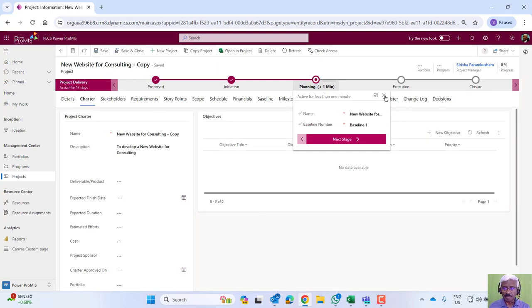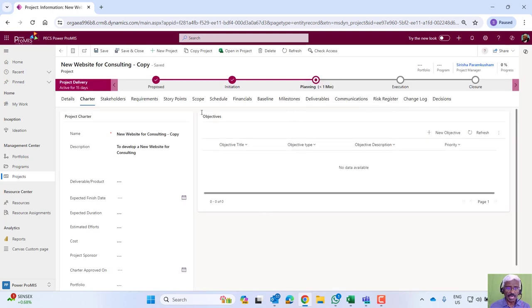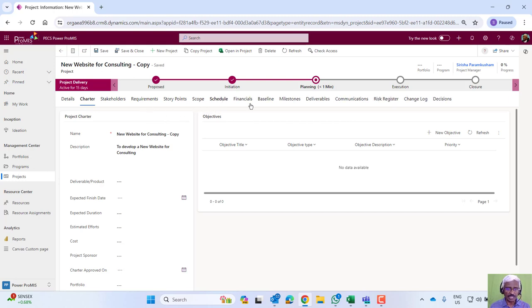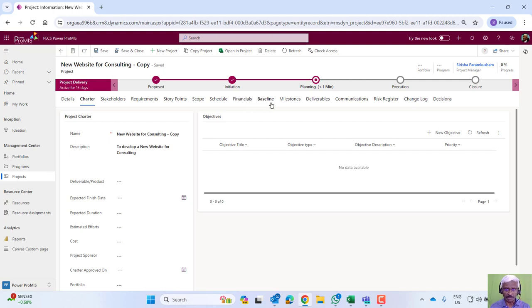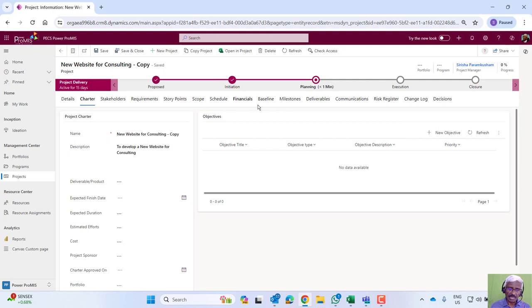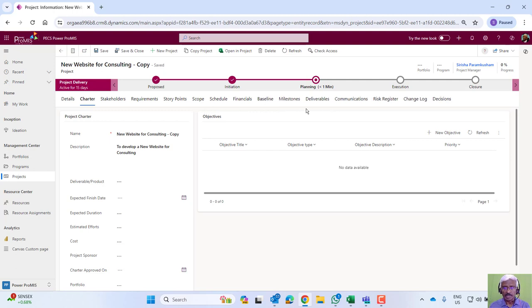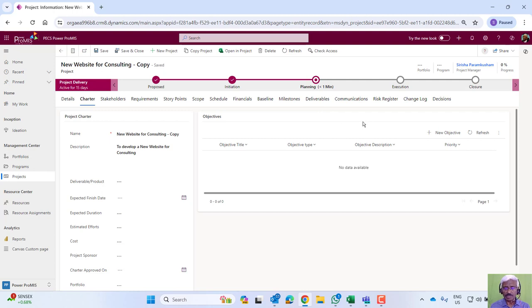You'll see a number of plan components are added here, like scope, schedule, financials from the organization to portfolio, program and project. Once the plan is completed, we can take a baseline, identify key milestones, deliverables, and plan the project risks.